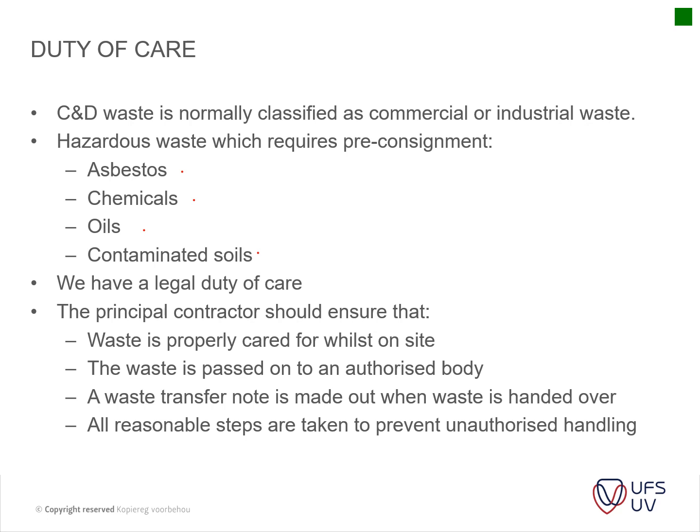So as soon as you're doing a pricing on a project and you see there's asbestos, immediately start asking questions: is there enough money allowed for it? Identify it as a risk whenever you're pricing your documents also. Okay, then we have a legal duty of care. If we know that we're going to work with asbestos, the other risk is your laborers, exposing them to that.